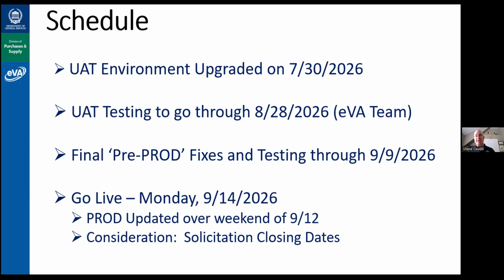And one consideration I wanted to get out here in front of everybody is about your solicitation closing dates. Are you getting ready to issue a solicitation? Do you have an open solicitation? What are the close dates looking like on that? Just something to look at. We will do some targeted messaging once we settle on a production weekend and then a production Monday for the system to be back up, just to directly contact anyone who has a solicitation closing on or around our production weekend and that production Monday.